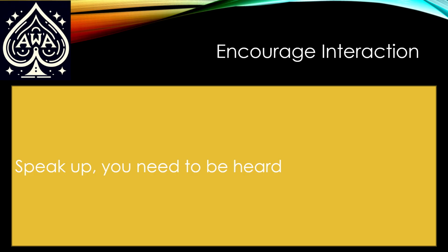But the earlier you get this information, the easier it's going to be to get it live, as opposed to finding out when you're doing systems integration testing or user acceptance testing or whatever it is, that this all needs to get rebuilt. That's going to be a problem. Again, you're not picking on people because it's fun. It is fun, but you're not picking on them because it's fun. You're picking on them to try and get them to talk up, to make sure that every avenue has been explored, that if there is an issue, someone is saying it early on.